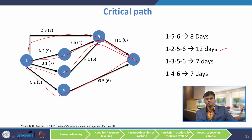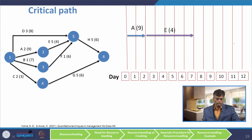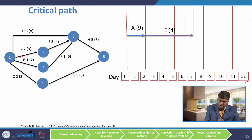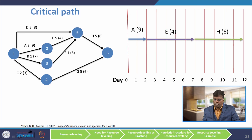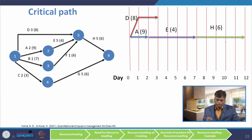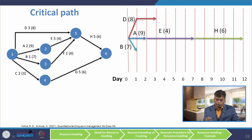We are finding critical activities because you cannot do any adjustment on them — there is no slack in those activities. I have given a scale up to 12 days and written all the critical activities: activity A, activity E, and activity H. Activity D has a duration of 3 days and a manpower requirement of 8 — the value in brackets is the manpower requirement. Activity B has a manpower requirement of 7 and a duration of 1 day. Activity F has a duration of 1 with a manpower requirement of 6.